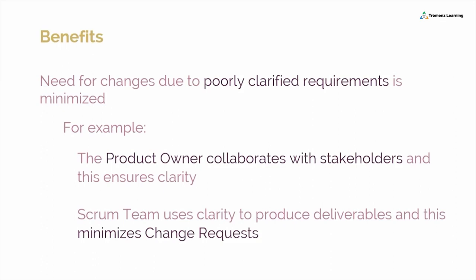The Scrum team collaborates continuously with the product owner and stakeholders through a transparent, prioritized product backlog to create the project deliverables. The processes Conduct Daily Standup, Refine Prioritized Product Backlog, and Retrospect Sprint provide scope to the Scrum core team members to discuss what's been done and collaborate on what needs to be done. Thus, the number of change requests from the customer and rework is minimized.